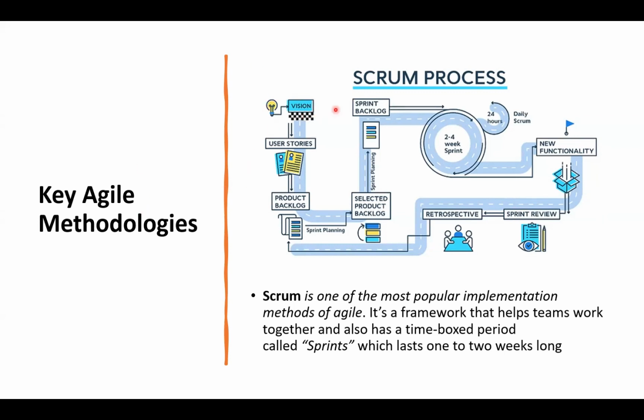Yeah, so what happens is this. When we started, we had a vision. This is what we're going to do. We're going to design this app for Naviscare, and it's going to have 1, 2, 3, 4, 5, 6 features. Key features are what it's going to have. Then you now create what we call user stories. So I'll give you explanation about this in some future slides. We have what we call epics, we have what we call the user stories, and then you have what we call product backlog. So that's all the different stuff you are going to do for the project, for the product, all the different stuff you're going to do. You plan all of them, put everything together.